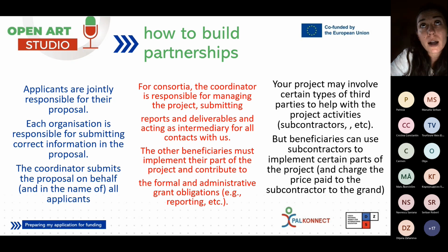Also, he is responsible because he is the intermediary organization between the European Commission and the partners, and also with the agencies if we have an Erasmus Plus project. And of course, he is responsible to take care of the reports during the implementation of the project till the final report. And of course, your project may involve third parties and certain types of third parties to help with the project activities, subcontractors, etc. Beneficiaries can use subcontractors to implement certain parts of the project and charge the price paid to the subcontractor to the grant. Most of the times, the subcontracting is mentioned in the application, and it needs to be identified during the writing procedure and before the submission.